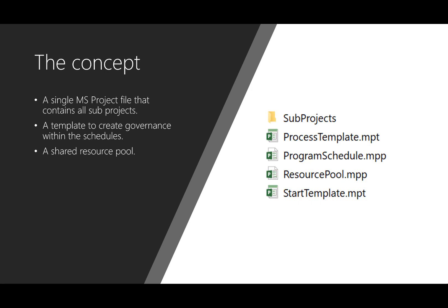What we're going to create is a single Microsoft Project file that contains all subprojects. There's also going to be a template to create governance within these schedules. So if you have a custom field, let's say department or a KPI value, those fields will be the same in every schedule that you create from now on for that single program of course.